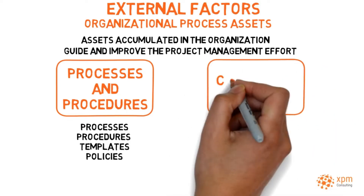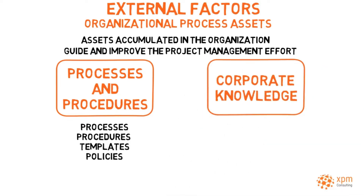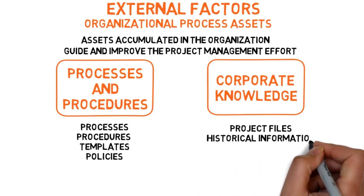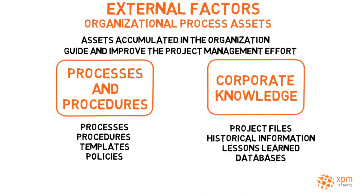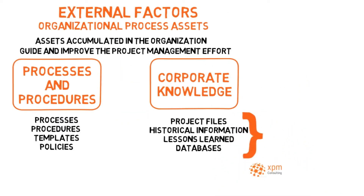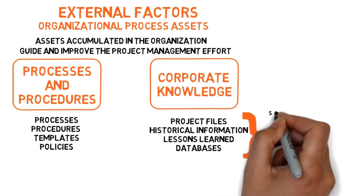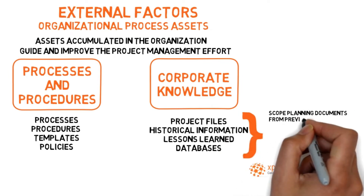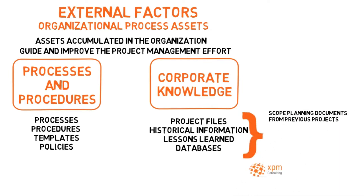Organizational process assets can also include corporate knowledge such as project files, historical information, lessons learned, and databases. Typical examples of historical information or historical data are scope planning documents from previous projects, such as a scope statement, a work breakdown structure, and a WBS dictionary.